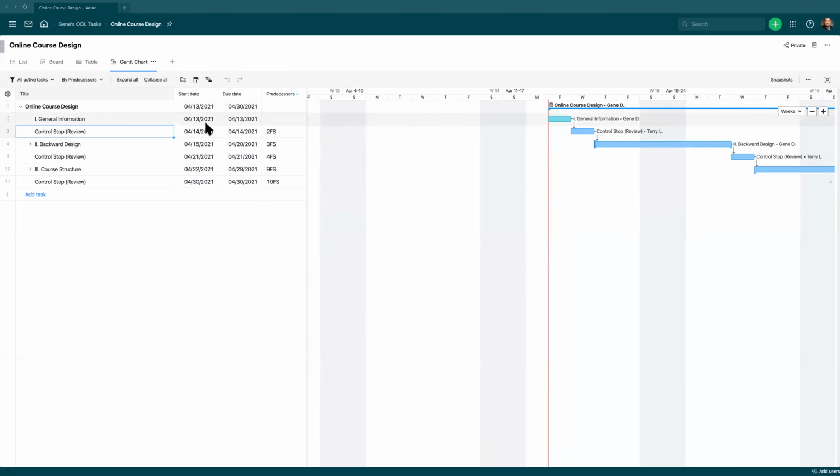The third part of the project management definition that we were using from Dr. Lewis was the control principle. This is where you compare where you are to where you are supposed to be. Any deviations require corrective action to be taken, and I add on to that, before you can go on to the next task.